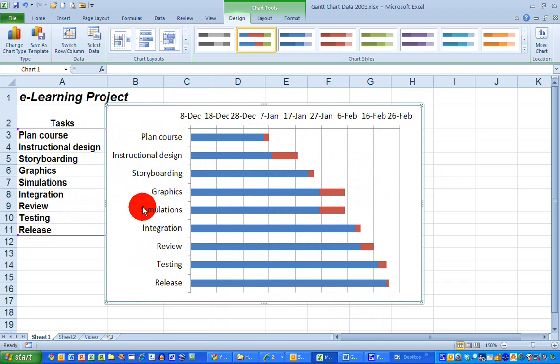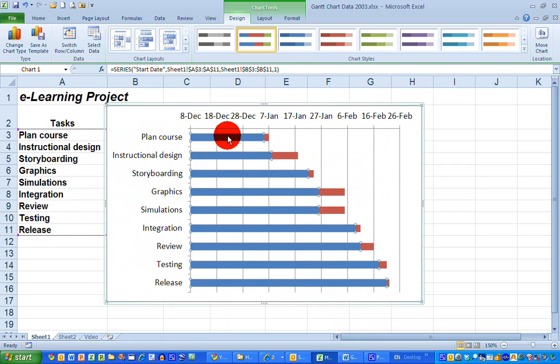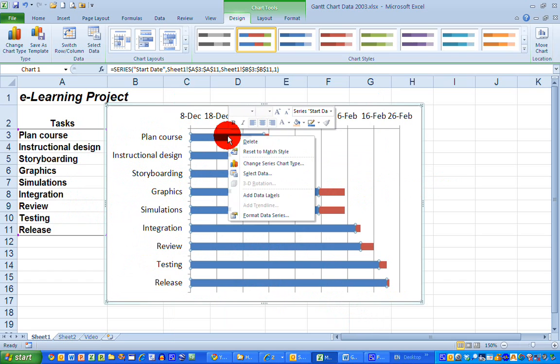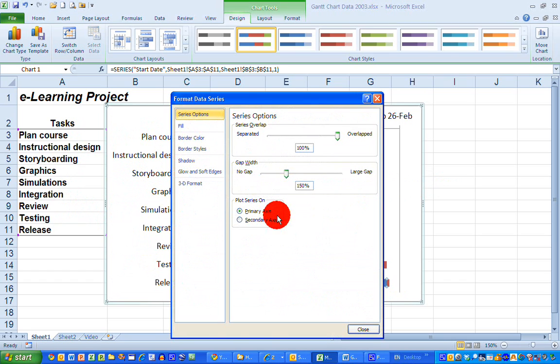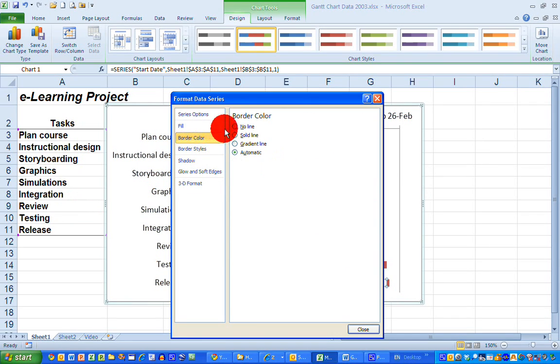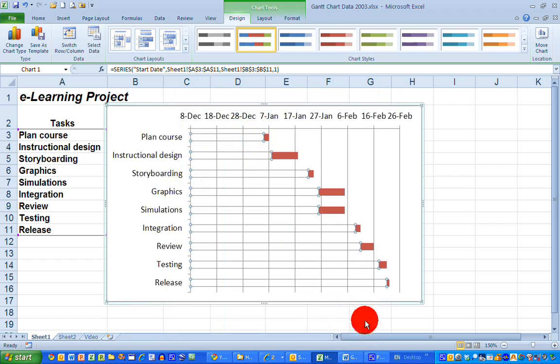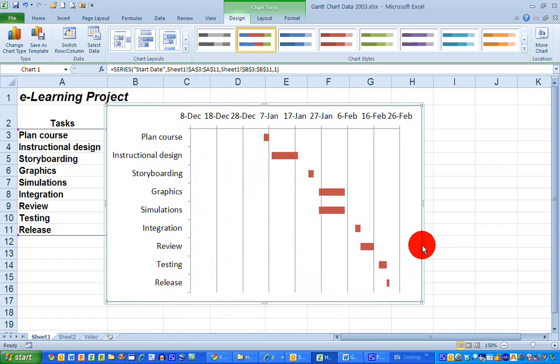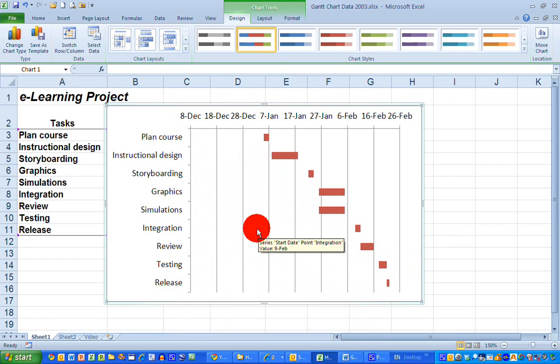Now the next thing I want to do to make this look a bit more like a Gantt chart is I need to get rid of the blue bars. So that's quite easy to do, all I'm going to do is get rid of the colors. So right-click on this, select format data series and under the fill option here I'm going to select no fill and under the border color I'm going to select no line and that will have the effect of getting rid of the blue bars. Now they are still there but they are invisible. And you can see over here on the right-hand side I have now got something that much more resembles a Gantt chart.